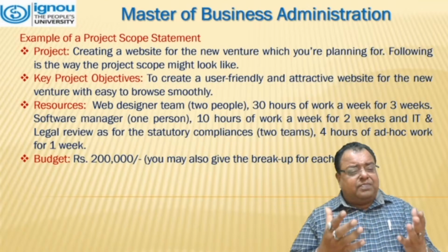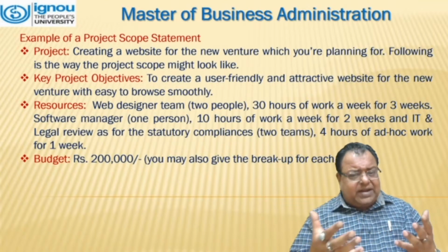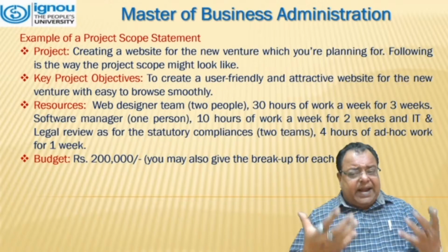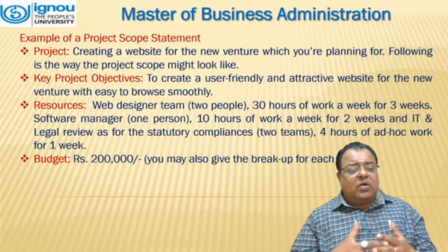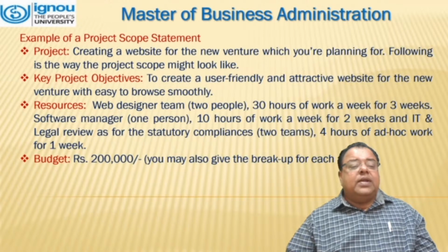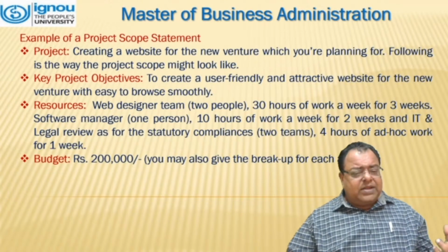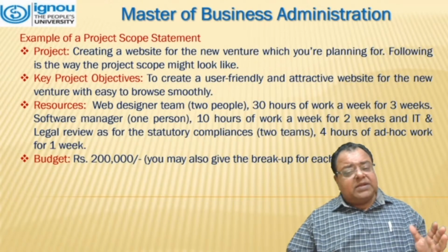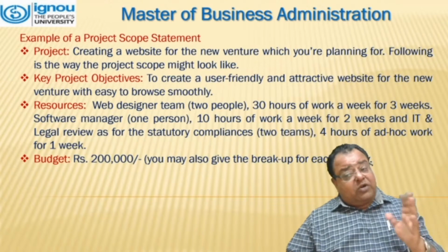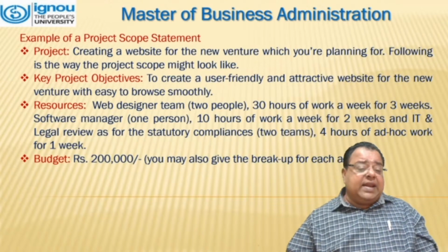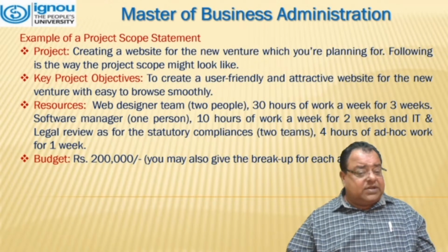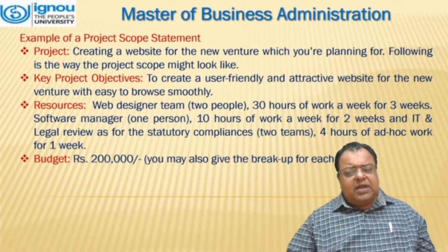That is, key project objectives: to create a user-friendly and attractive website for the new venture which is likely to browse smoothly. Second one is resources. Web designer team, two people, 30 hours of work a week for 3 weeks. Software manager, one person, who will work 10 hours a week for 2 weeks, and IT and legal review, as for the statutory compliances, two teams, 4 hours of ad hoc work for a week.